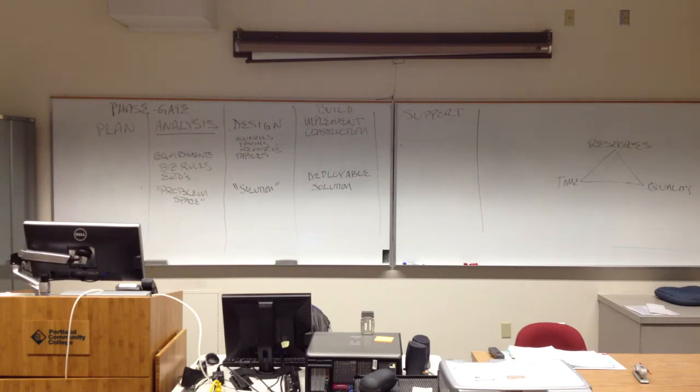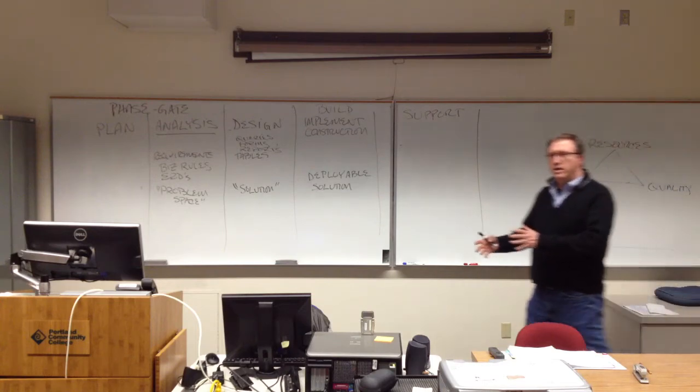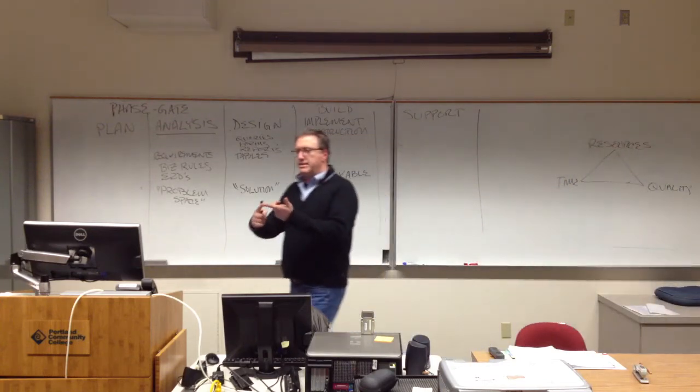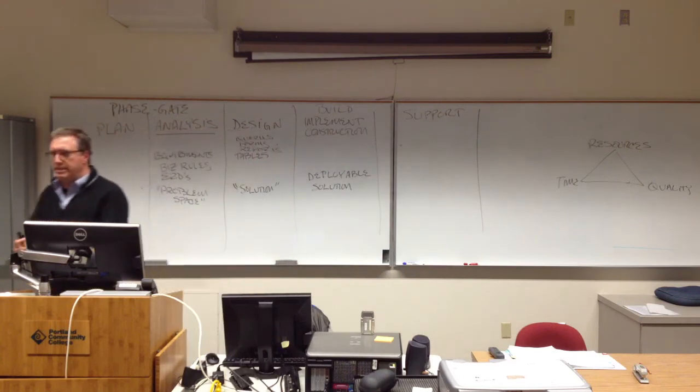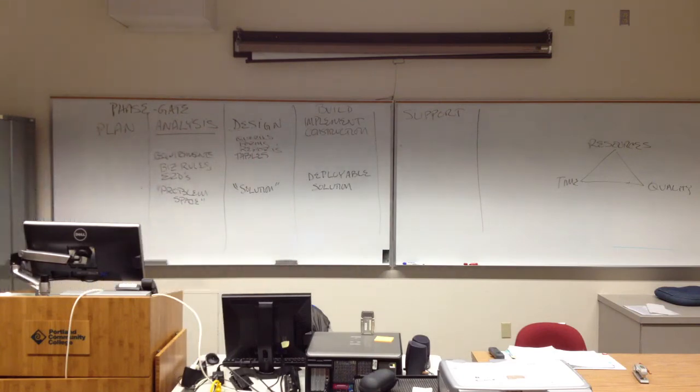So the customer, they had the same customer for 20 or 30 years. They had a lot of knowns. You know, there's knowns and there's unknowns. They had very little risk because they had the same people, they were building the same kind of product, they had the same customer, and they were experts. They were the world's experts in this. So when they said it was going to take 18 months and we're going to take a team of 10 people and it's going to cost $20 million, boom, it came in on time every time.